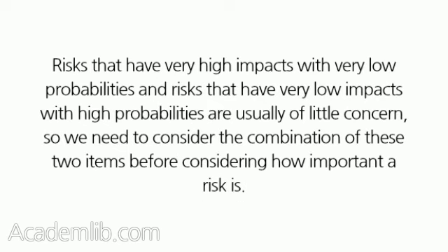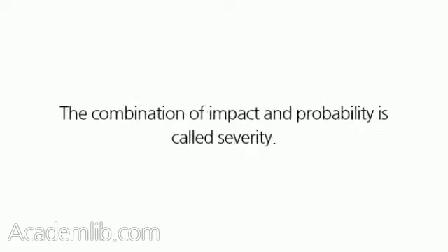Risks that have very high impacts with very low probabilities and risks that have very low impacts with high probabilities are usually of little concern, so we need to consider the combination of these 2 items before considering how important a risk is. The combination of impact and probability is called severity.